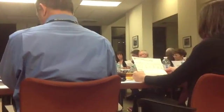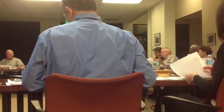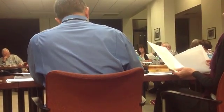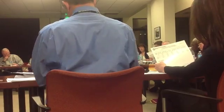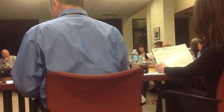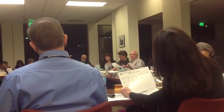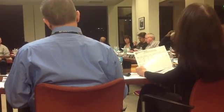But I think this kind of report, which I'll talk about when we get to change orders, at least helps illuminate a little bit of what's going on, especially this one, as you pointed out, a 20% change order. And at least it gives us some further indication. It troubles me that $539,000 worth of change orders, totaling 10 of the 20 total change orders, were not indicated. As we talked about at our last meeting, there's a lot of subjectivity to change orders, but when there's no change order reason or reason code at all, that's just not right. I think we can probably agree on that. So this kind of new report will at least help illuminate what's going on behind some of these higher change order projects.